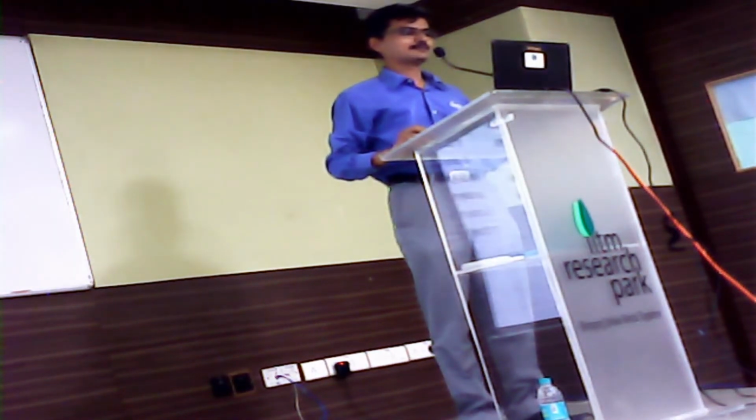I hope you could see that. Do we have a view where we can compare the baseline and actuals? That's what we are seeing right now. So if you go to the first task and say this task has taken more than 2 days, let's say 5 days. Do you see that? We actually approved it for 2 days. Now this task has taken 5 days to complete. So the actual days has been set. Now you see the slippage is also quite visible on the other end. Visually, if you want to see the slippage, this is how you see it.